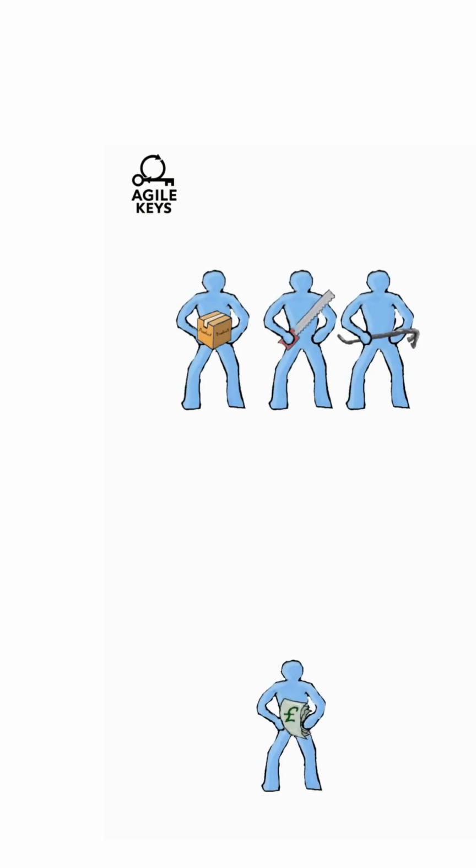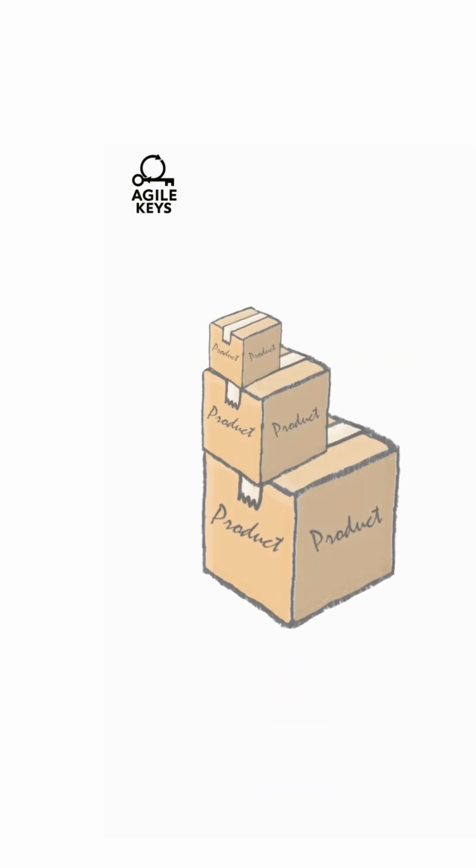Finally, the team and the stakeholders will discuss what steps to take next. What are the next stages of the furtherance of the product goal? As a result of feedback and comments within the sprint review, the product backlog may change, and information may be taken into the next sprint planning.